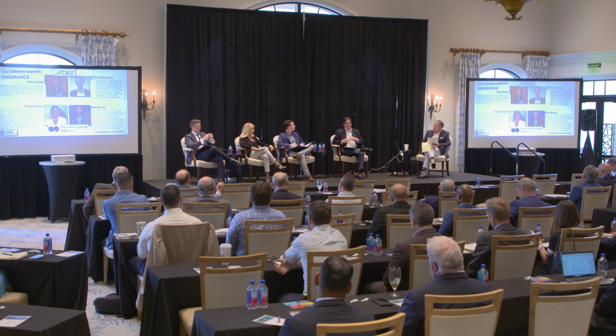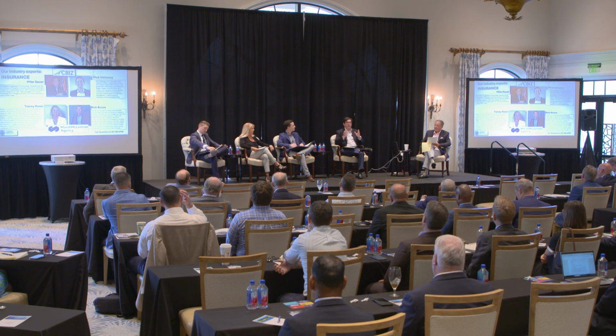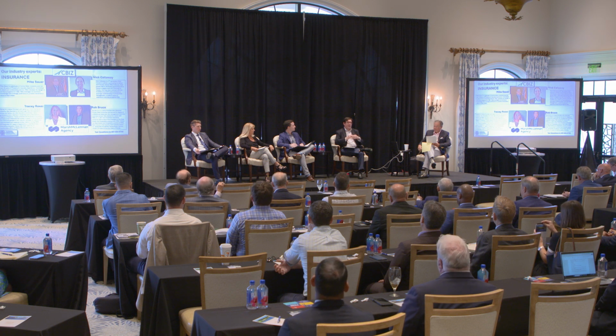Another thing to consider, and I don't want to call it a trade secret, but say you are doing your golf course renovation and a portion of that renovation includes a structure. If you're putting in a new restroom, or any kind of building whatsoever as part of that renovation, a lot of times what we can try to do is tie some of the golf course renovation into that structure. So once again, as I mentioned earlier, when you're talking landscaping, there's limitations. We have to be very aware of what we can and cannot purchase in the market right now.